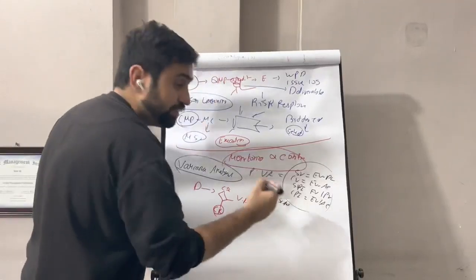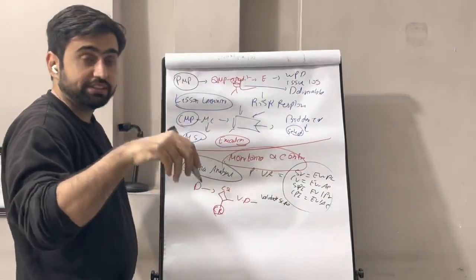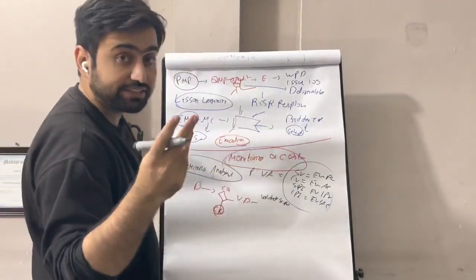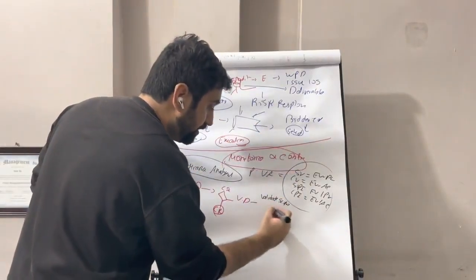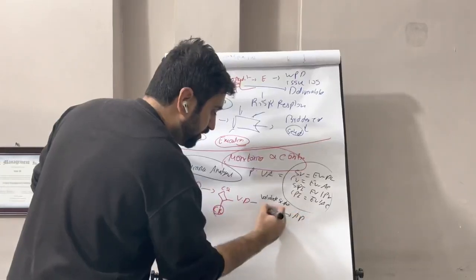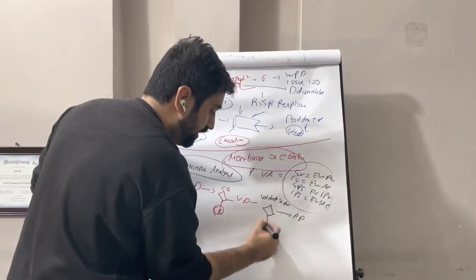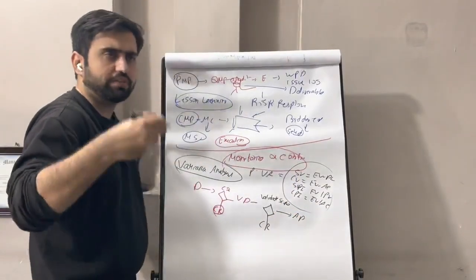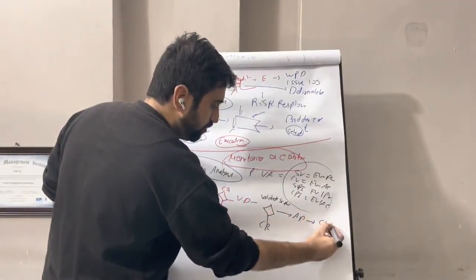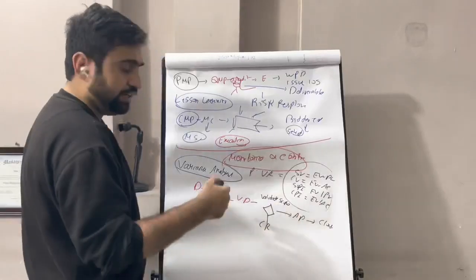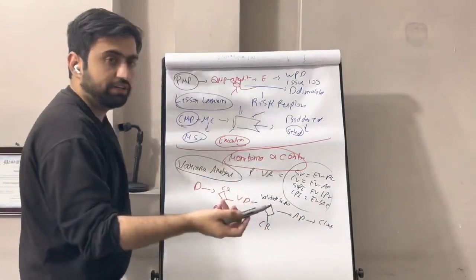In validate scope, the client does the inspection and decision making on them. If the client accepts according to the agreed scope baseline, it becomes an accepted deliverable. Diamond symbol here. If not, again it is a change request, on which we do preventive, corrective, and defect repair. And if it is an accepted deliverable, it goes to closing the project. I'll talk about closing in a while. So that is the journey of deliverables.